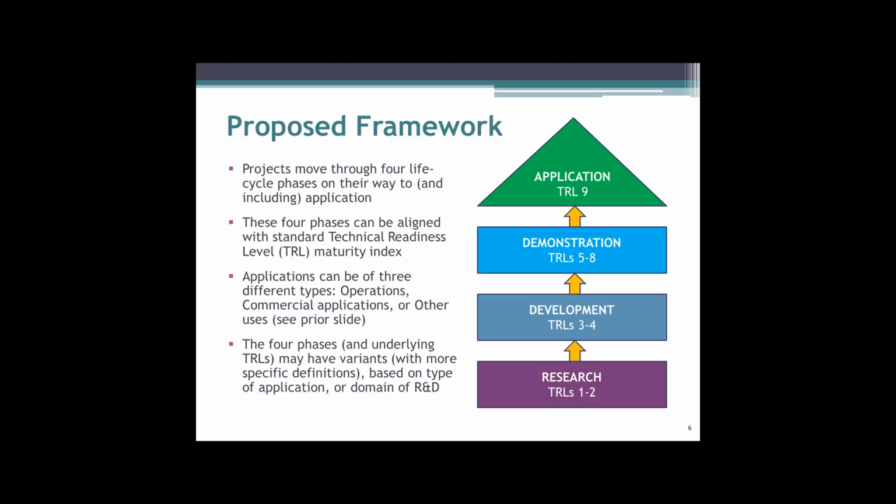So a particular project has this life cycle where it increases its maturity as you go up this pyramid structure, and there are increasing costs to move it up the ladder, so to speak, particularly going that last mile from a demonstration phase to actual application.